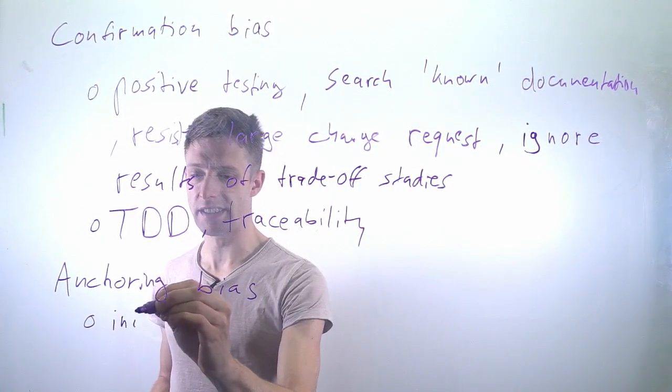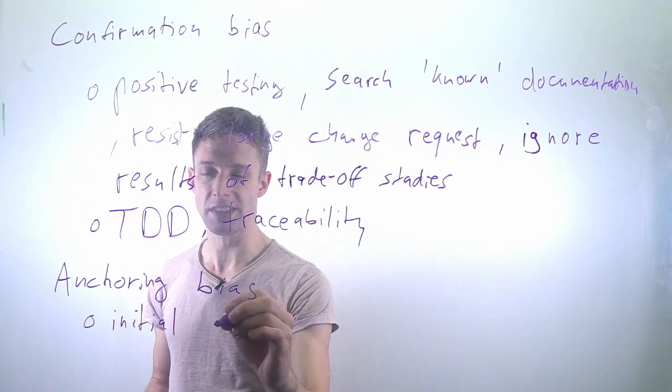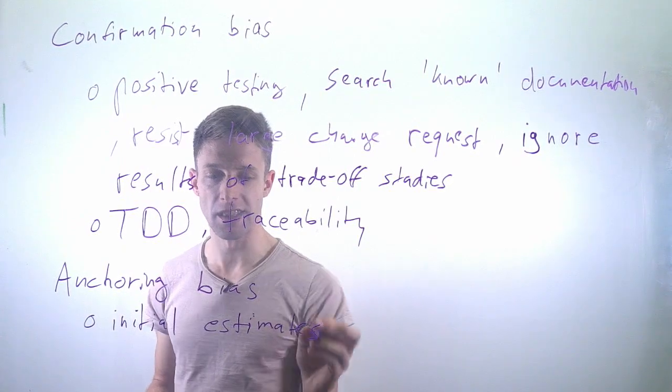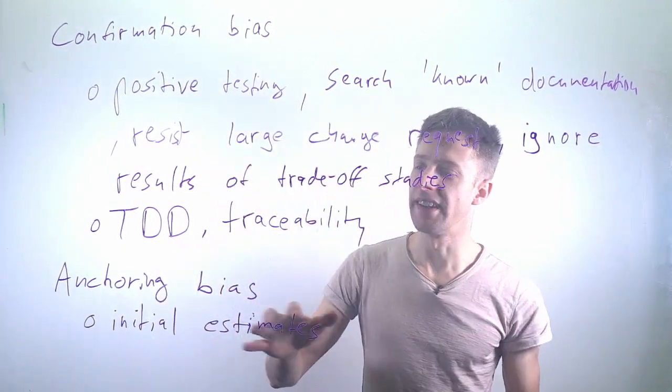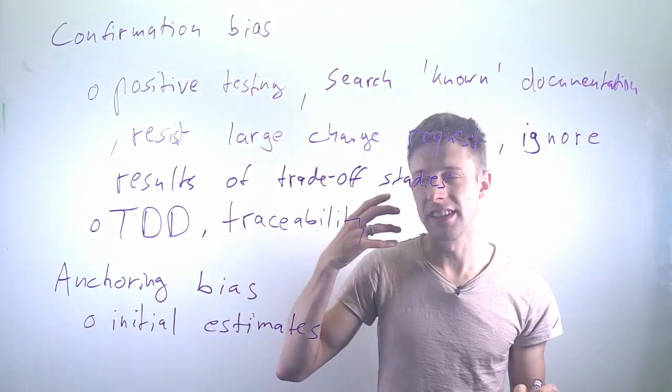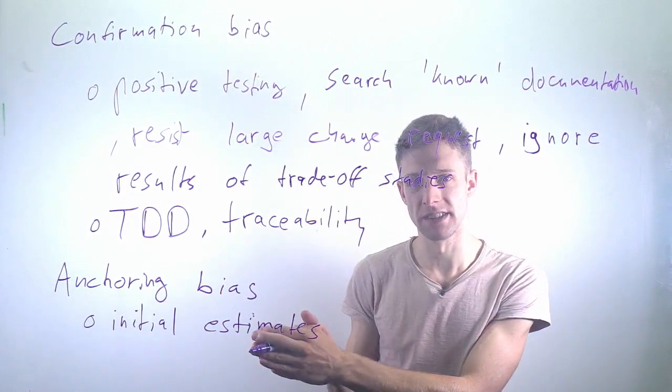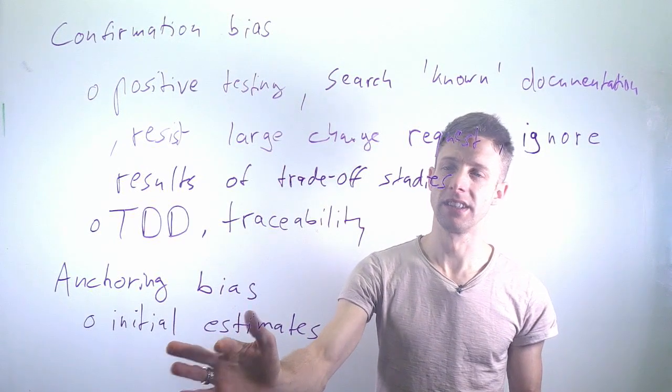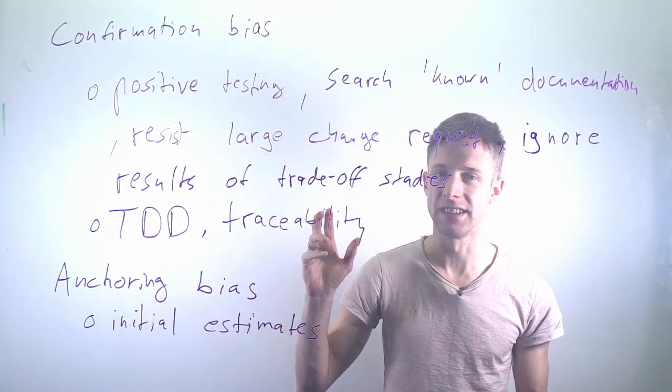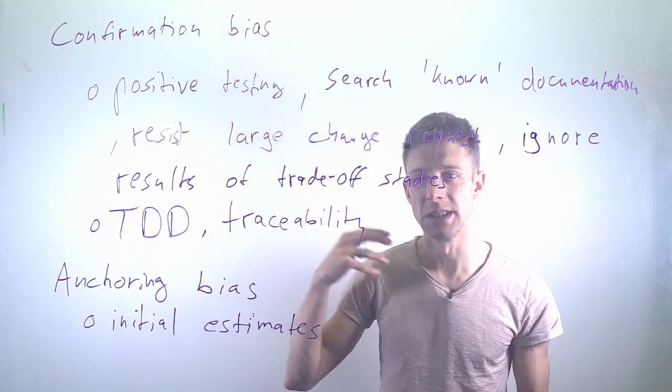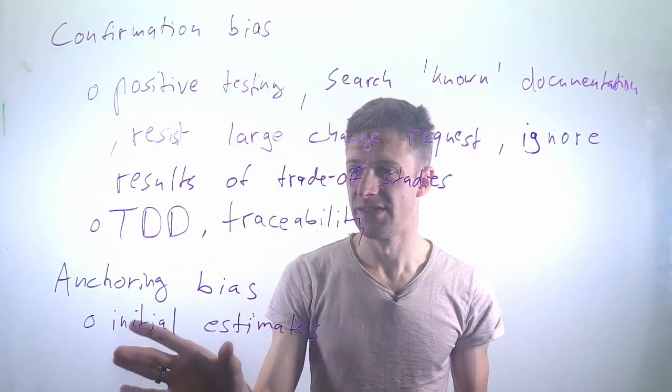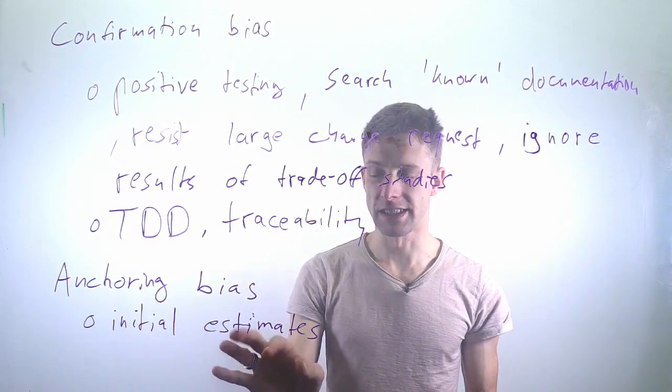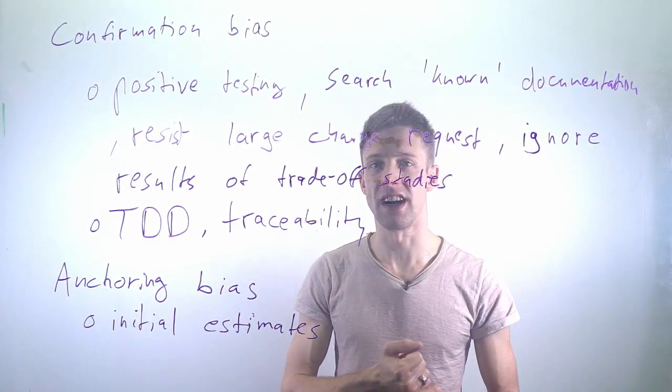In software engineering and many other projects, it's the tendency that we have our initial estimates—for example, estimating the project will take six months based on very little data. Later, when we have much better understanding of the project and could make better estimates, we have a really hard time getting away from this. Our initial six months means our estimates in the future will always be close to that.